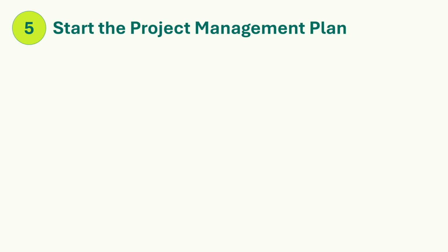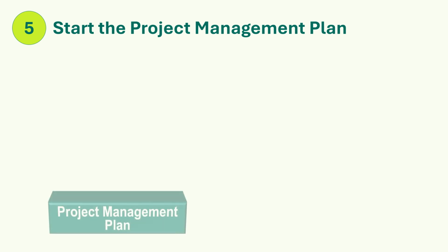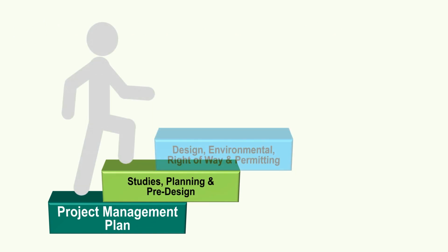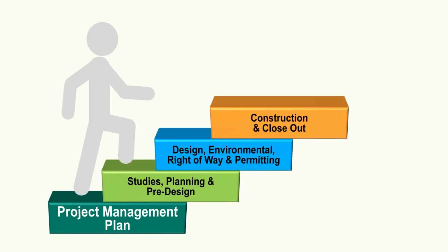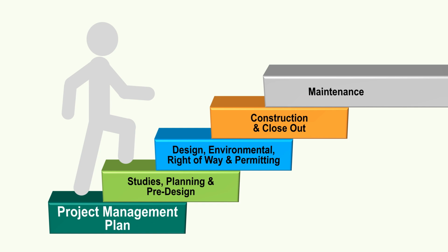Step 5. Start the Project Management Plan. A Project Management Plan, PMP, is a blueprint to the entire team and the teams for the other phases regarding the execution of your project, outlining the who, why, how, when, and what-ifs. The PMP is the foundation of project management, and all future project phases will be based on this document. This PMP will be passed on to the construction phase project manager, and possibly other design phases project managers if you are the project manager for only the first phase.